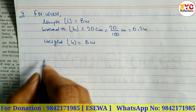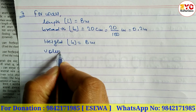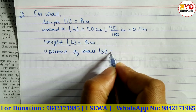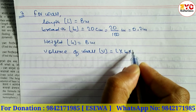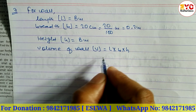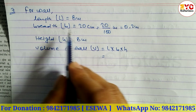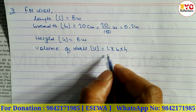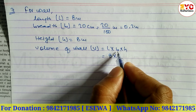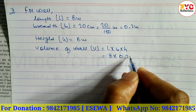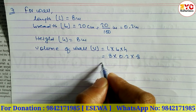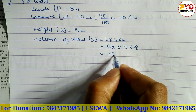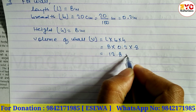Now we have to find the volume of the wall. Volume of wall V = L × B × H. So that is 8 × 0.2 × 8. First 8 × 8 = 64, then 64 × 0.2 = 12.8 meter cube.